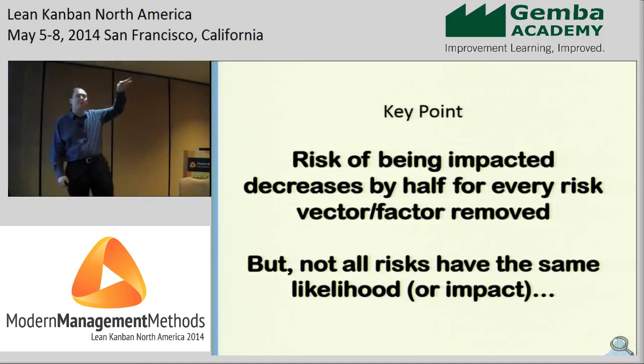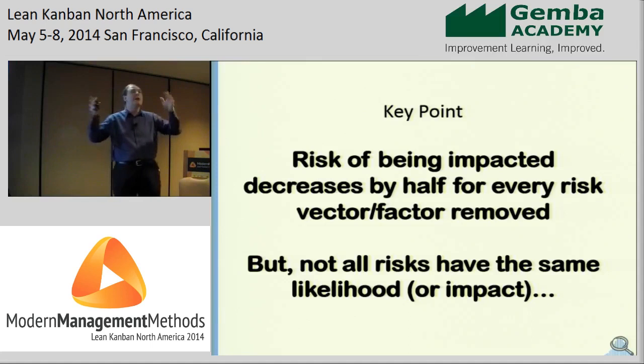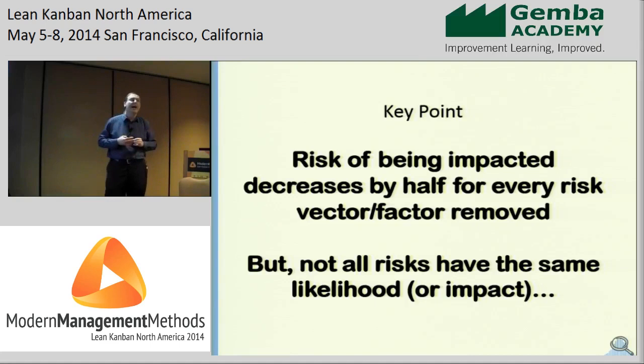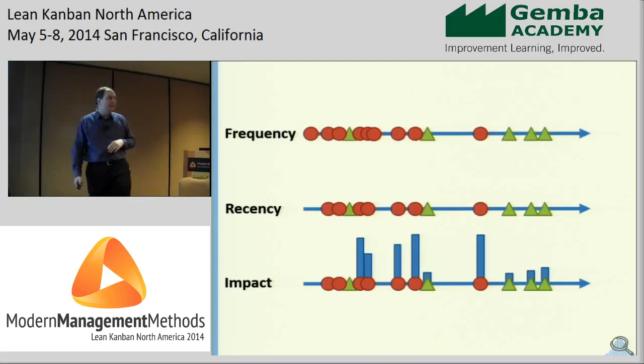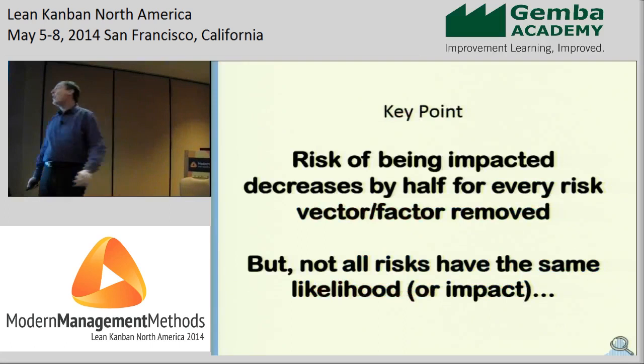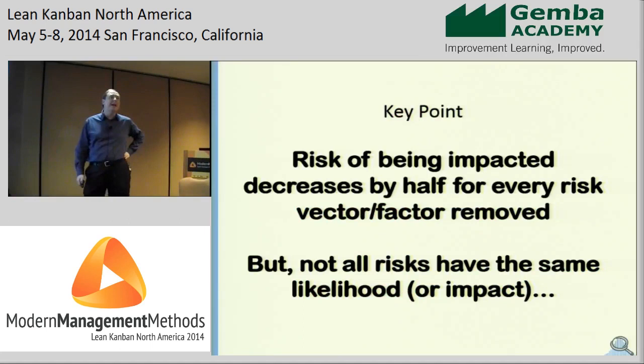What did we just learn? If we reduce risks or dependencies, every risk we reduce halves the number of possible combinations. There is no risk vector that isn't worth removing — every one of them in a category has the opportunity to halve the number of delay cases. You go from one in 128 to one in 64. So now: which ones are cost-effective to remove? How do you choose which risk is in your economic interest to remove?